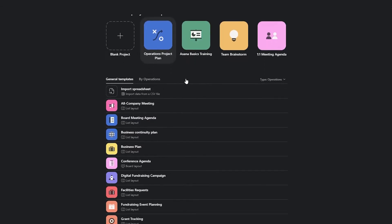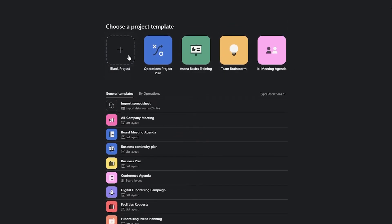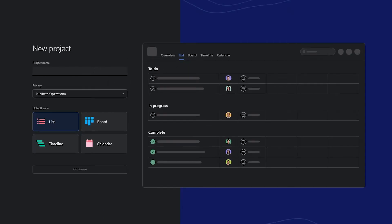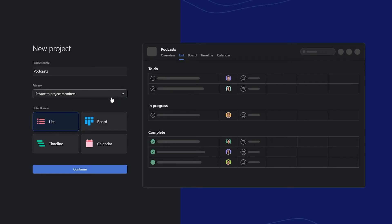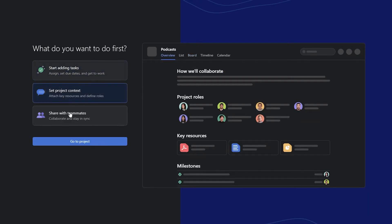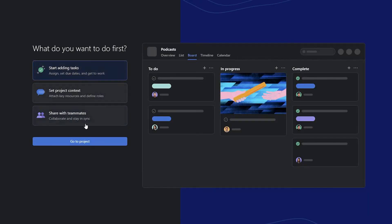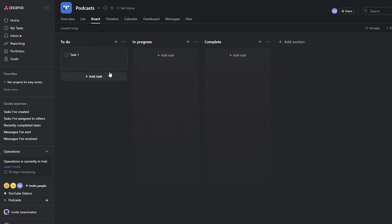You can choose from various templates or start with a blank canvas. I'll create a new project called 'Podcasts' since I also work on podcasts. I'll set it to private so only assigned members can view it, switch it to board view, and click continue.